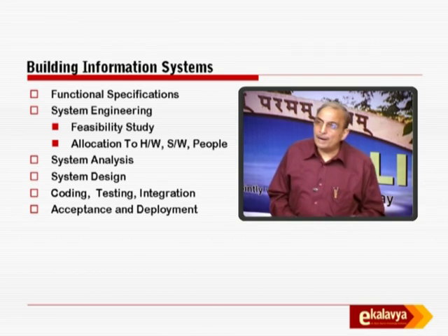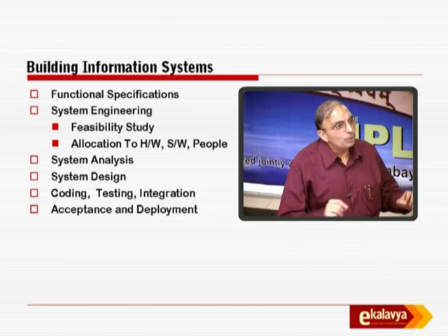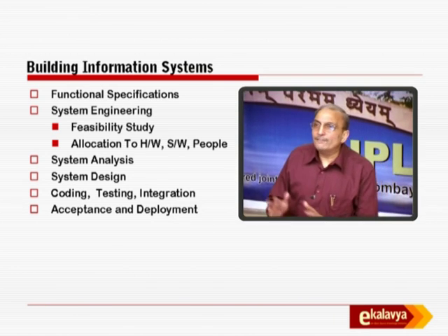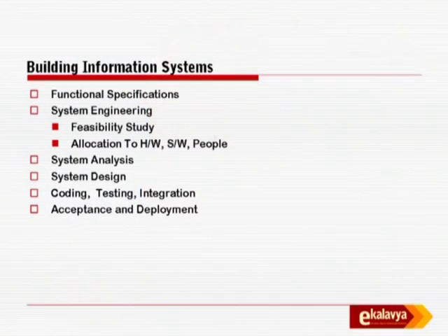And if the software requirement specification document is, let's say, 300 pages, it is not uncommon to have almost 500 to 700 pages of the design document for that. You get the point? That is what a rigorous engineering process is. After this, you start coding. Not a single line of program is ever written in this process till the software design document is ready. You might write some lines of code as an experiment or prototype, as we shall see later. But none of that code will ultimately go into the final system. The actual coding starts only after the design document is ready, not till then.